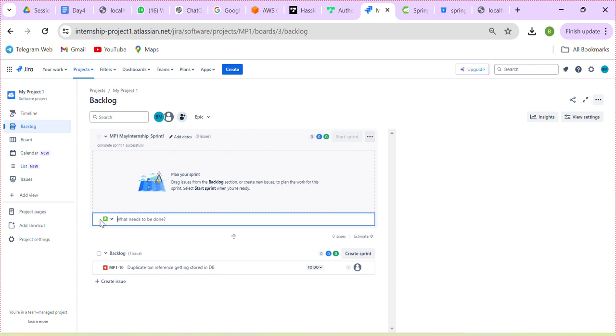Here we can see the colors. Green is a user story. A story is what is given by the product owner. Developers create tasks, testers also create tasks, and the scrum master also creates tasks. Where bugs come up, we can put them in as bugs. Anyone can put in tasks and bugs.